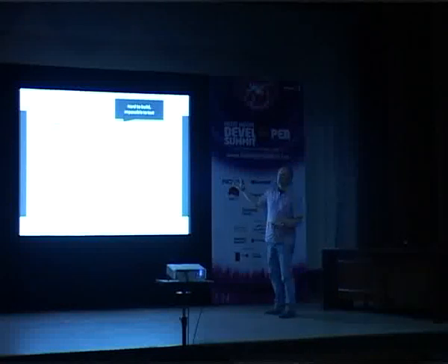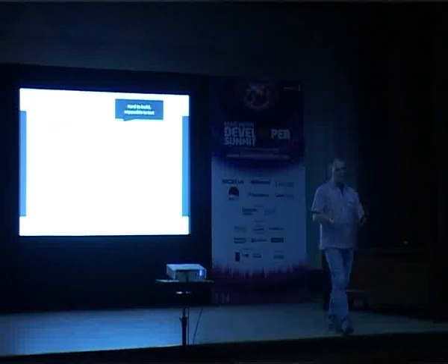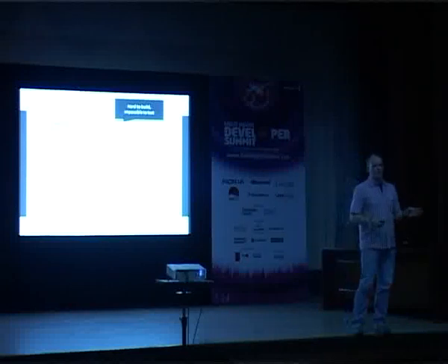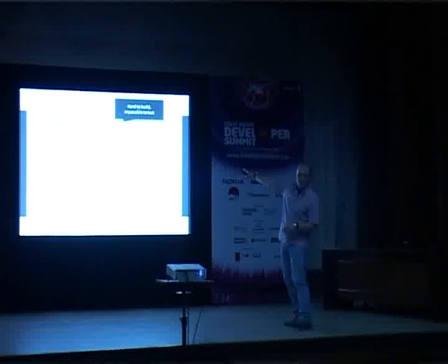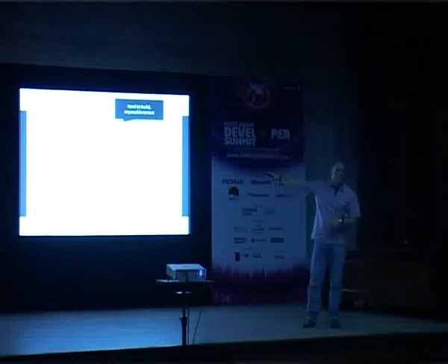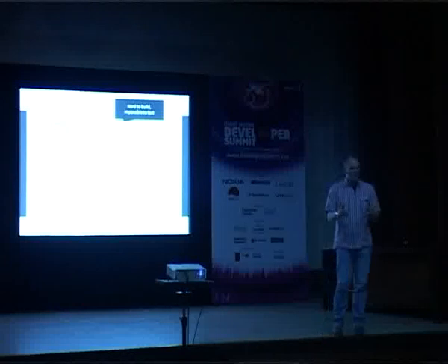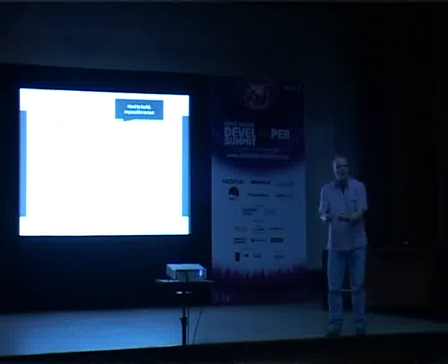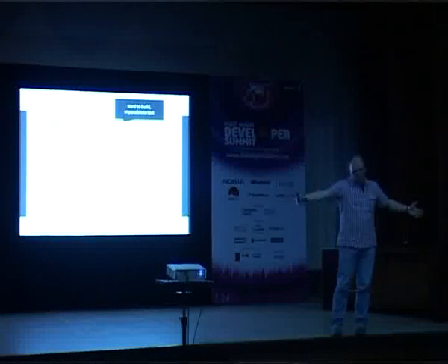Actually, the project failed. So I call this a huge case. Huge cases are not a very good requirements technique, especially in an agile project. In this particular project, implementing this simple use case, which is out here, took them 5 months. Now, if you work in 2-week iterations, like I usually do in projects, you want to wrap up multiple work items during one iteration, not one that stretches over 5 months. So that's a totally different ballgame.